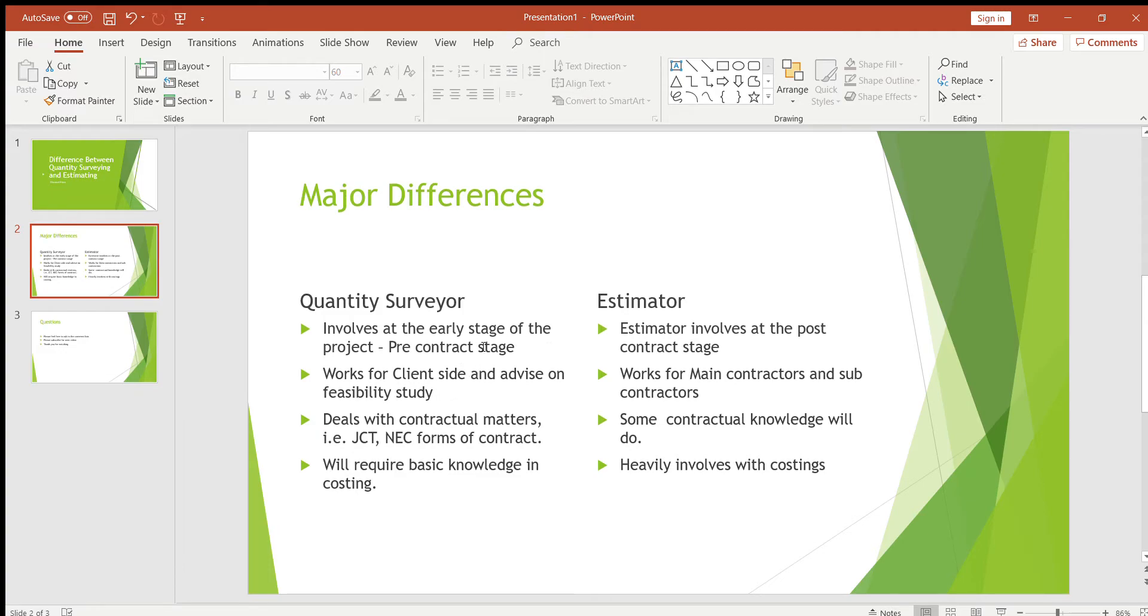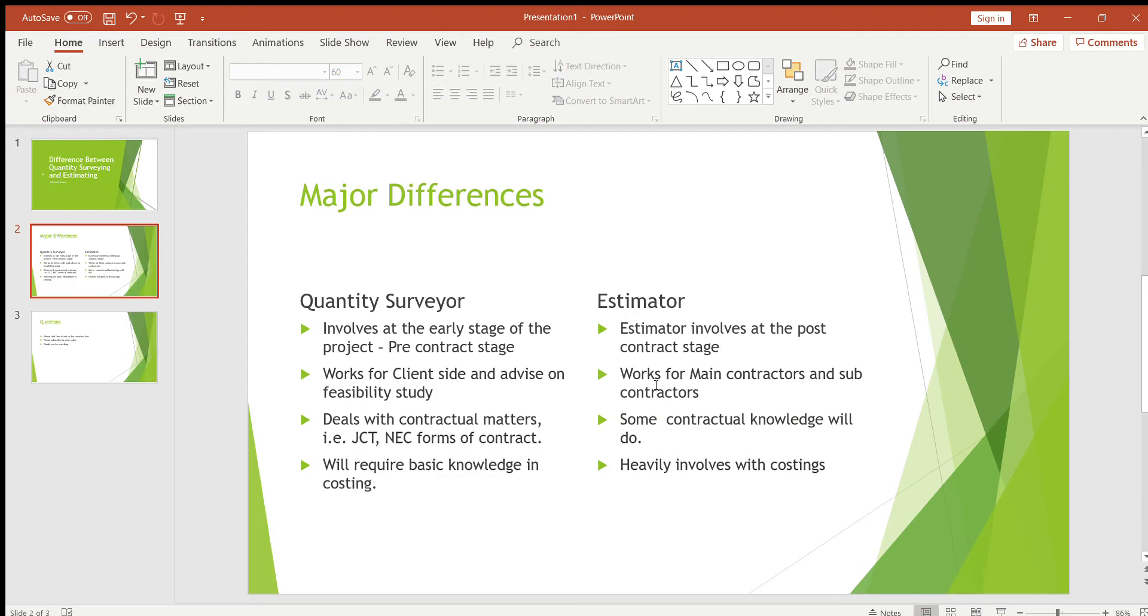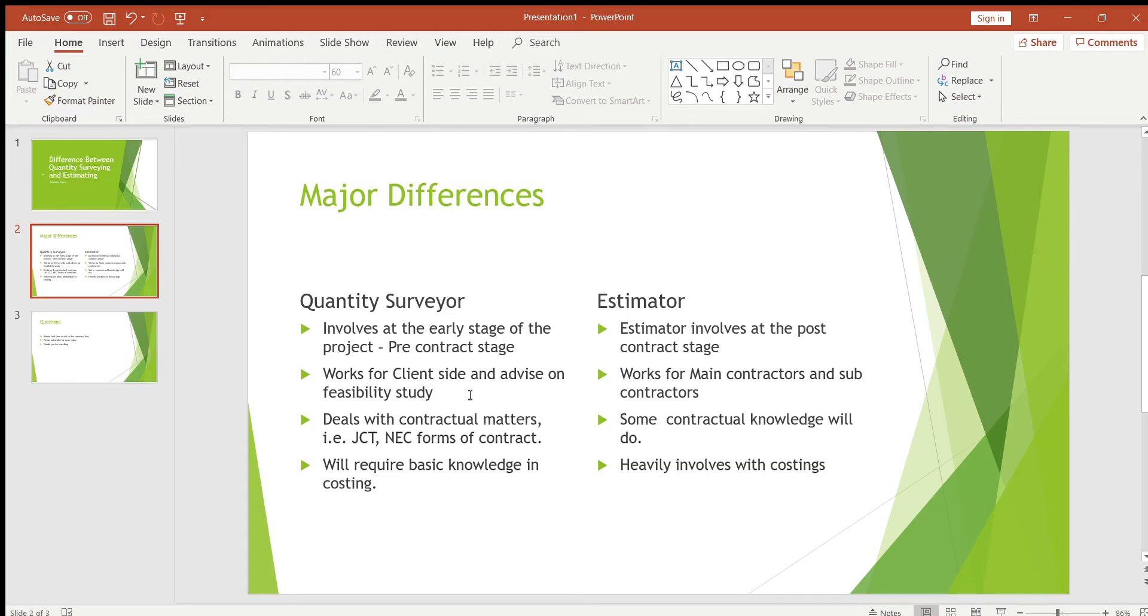Second one, quantity surveying works for client side and advises on feasibility study, whereas estimator never works for client, only works for main contractors and subcontractors. Here I mentioned quantity surveyor advises on feasibility study.